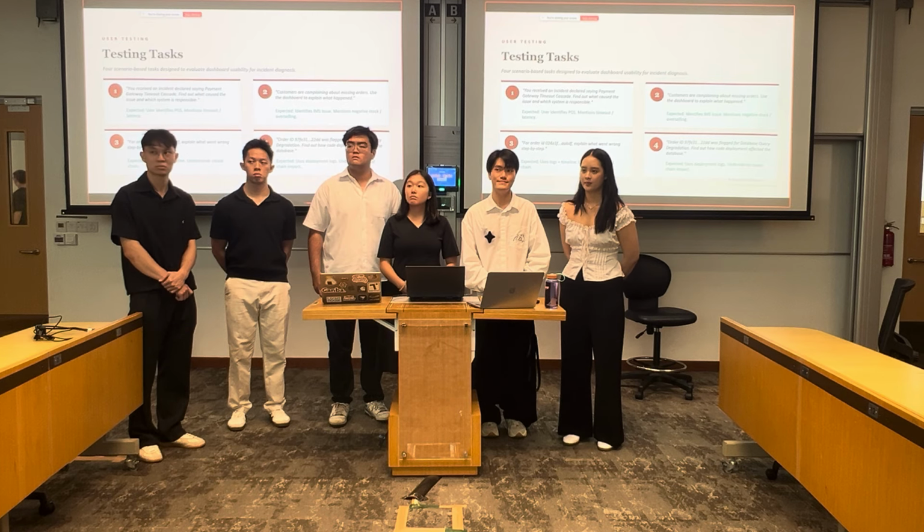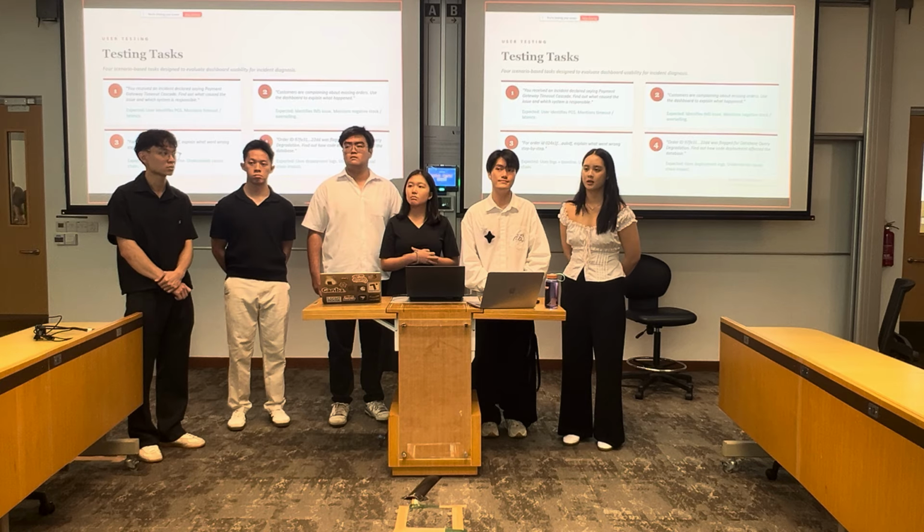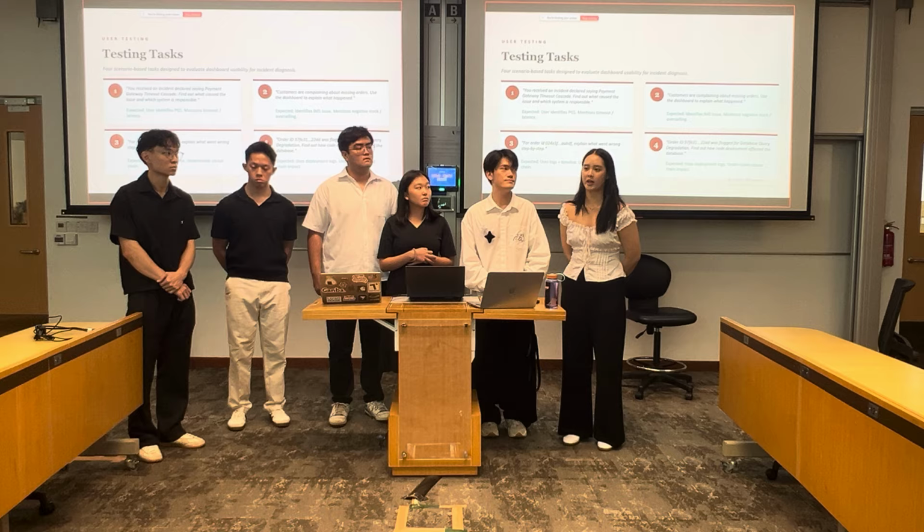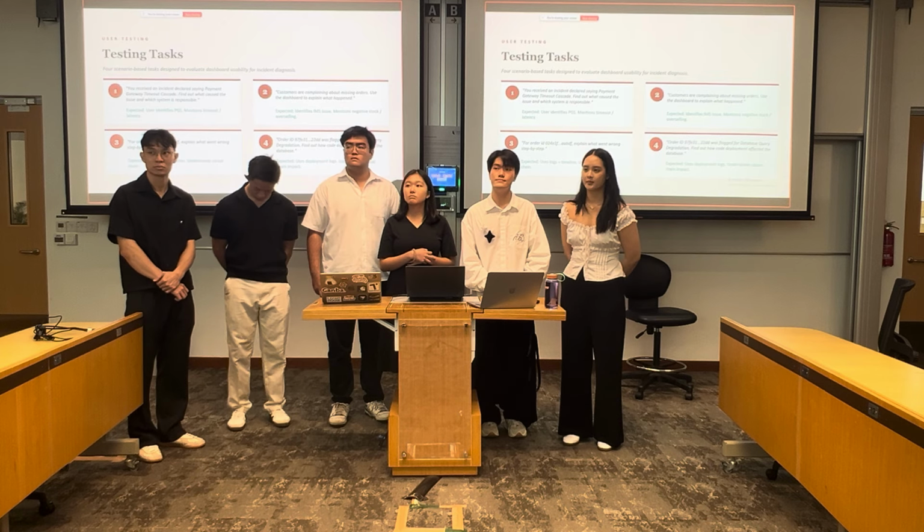So you reprioritized those new changes against what was there, and left some behind. Yes, we clarified what would make the most impact and what could be accomplished within the time, and it was agreed with the sponsor.